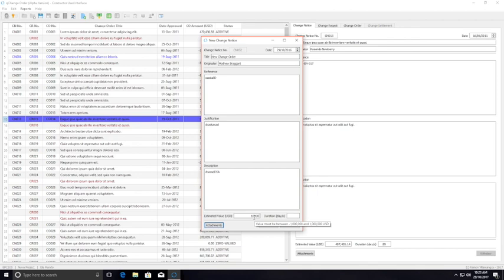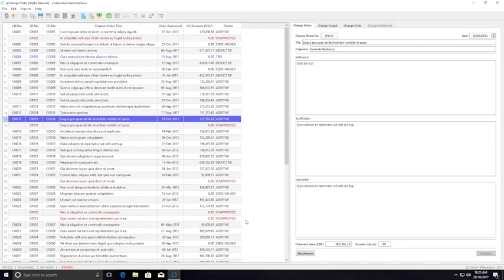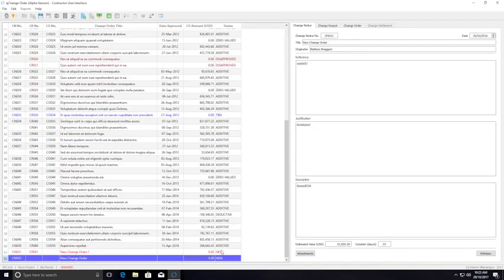In our company, I think, but I don't exactly know now, if it is beyond this limit, it should be an amendment and cannot be a change order. So 10,000 and 23 days. Okay. Now we submit. So it is unsaved, but as you can see, it's already there.